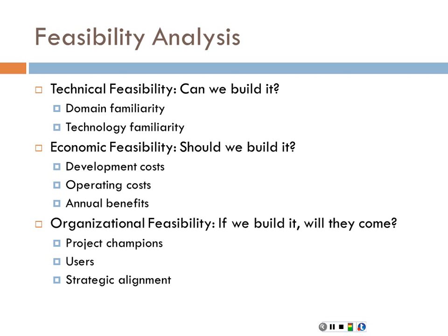And so all this will culminate as you do a cost-benefit analysis, to project out over the long term what the break-even point is. At what point does the system actually pay for itself, outweighing or meeting the costs, and then project out after that what the overall benefits are going to be for the project.